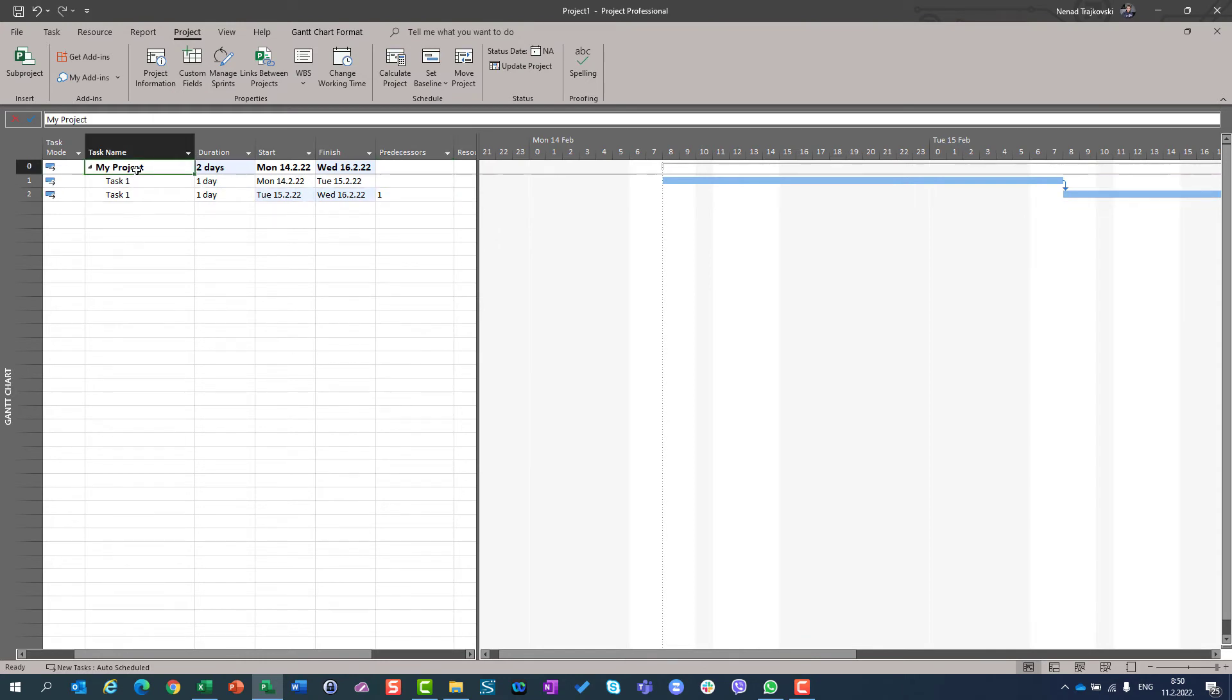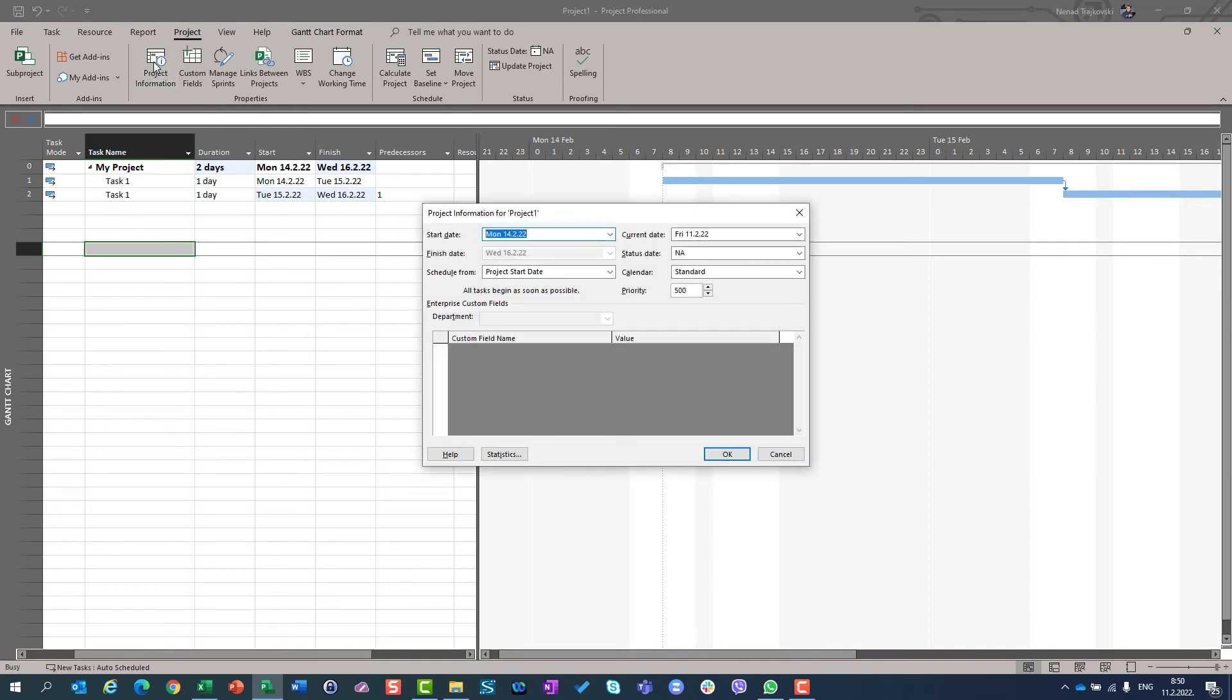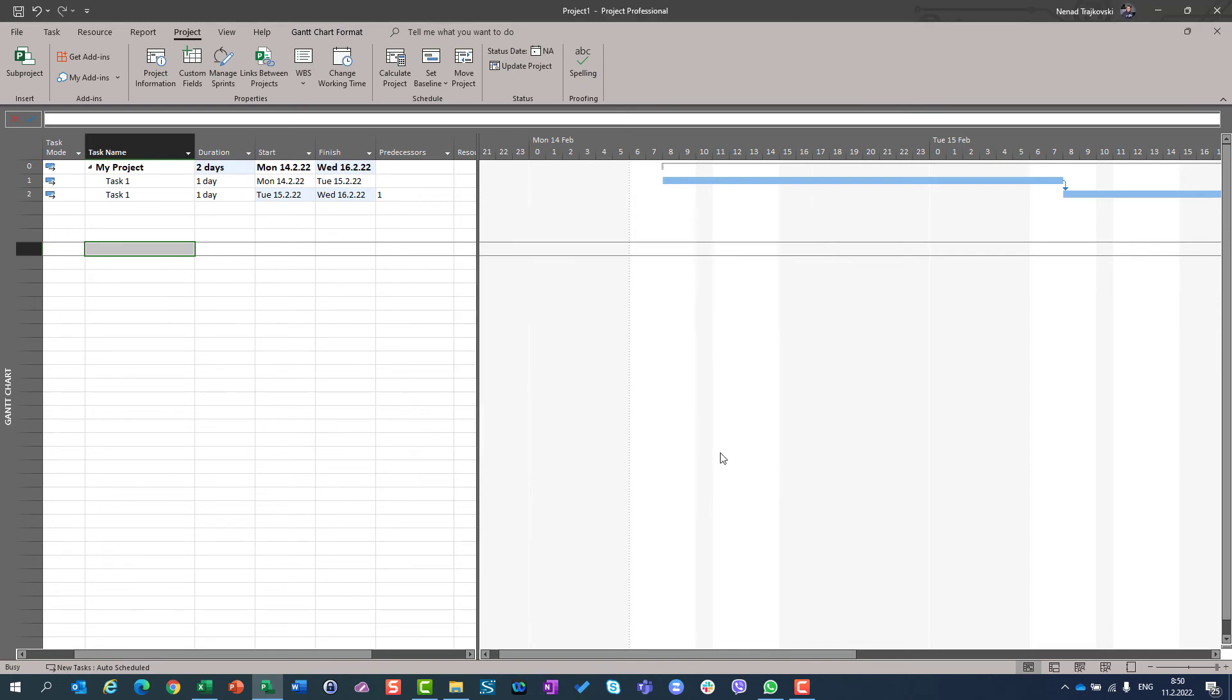If you want to get right results, go to project summary task or wherever you want. Go to project tab. Go to project information and you can see the start date, which is 14 of February. I want to start it at 6am. So, I am going to put 6-0-0 behind that start date. So, I have start date and if I put 6-0-0 and I hit OK,